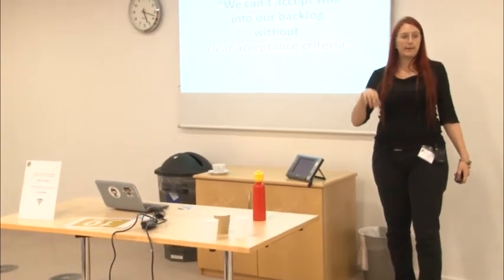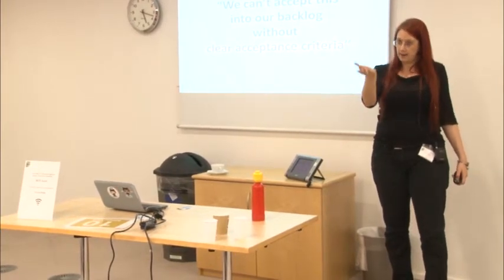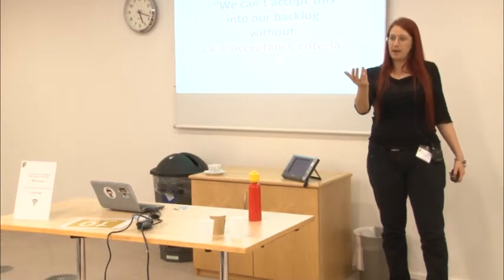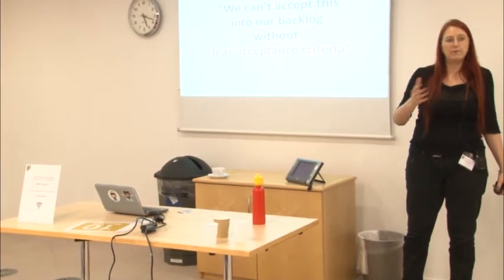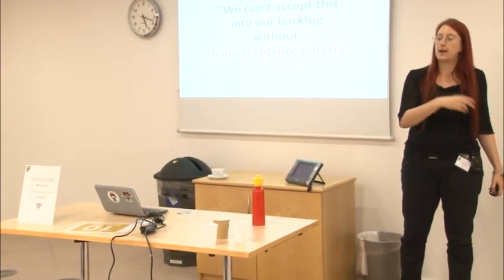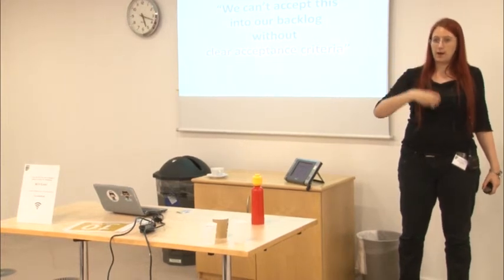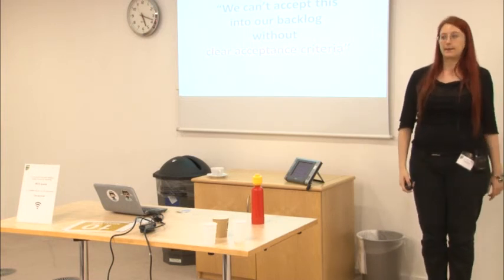Instead, if the business are uncertain, they can't give you clear acceptance criteria, ask, is this because this has never been done before? Is it a 5 and 4? If it is, can we try something out? Can we spike something out for you? What would it roughly look like? Okay, let's give it a try and we'll get feedback as soon as possible. And that's a much more mature adult way to approach uncertainty than going, oh, I'm sorry, we can't accept that into our backlog.